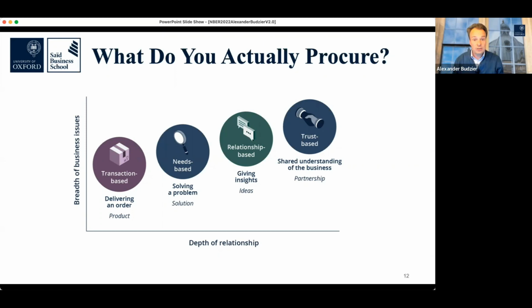And each of the shortlisted bidders goes through these scenarios, and it takes a week. So they come in for 3 full days. They're not allowed to bring any lawyers, just for the client to then select the people that they think as a JV have figured out how to work together and how to make decisions together. So a massive amount of investment there in the procurement, when on the left-hand side in the transactional space, you would have much leaner, much meaner procurement processes, much more focused on different elements than, say, for instance, ability to jointly solve problems.